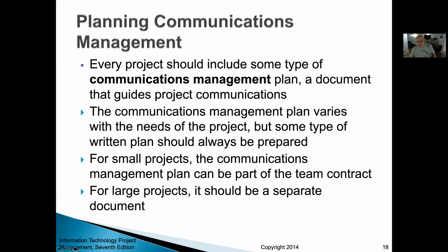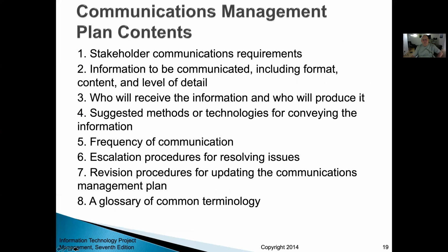Every project should include some type of communications management plan, a document that guides project communications. What's in a communications management plan? Information to be communicated, who will receive the information, who will produce it, suggested methods, the frequency, escalation procedures for resolving issues, revision procedures, and a glossary of common terminology.